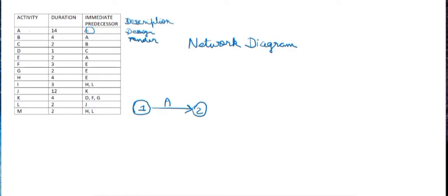Now as we can see here that for activity B the immediate predecessor is activity A, so I'll draw the next arrow that will represent my activity B and here I'll write it as 3.